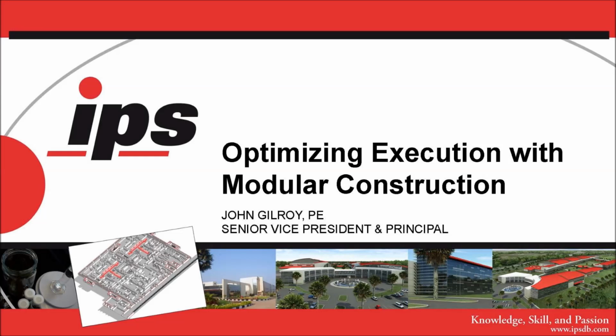Reasons to choose modular construction. A lot can be done outside while, say, a structure is being built. If you have a 4 to 6 month addition being done and then you want to fit it out, you can have a lot of things being fabricated modularly at a remote location, commissioned and brought into place in a timelier fashion and started up.